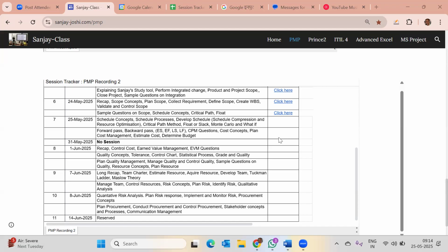So mostly he will add it into the next sprint backlog, Kuldeep. But that's not the ideal way to get it put in. You don't do it. What I mean is that the team should not do it. Let the product owner do it. Sprint backlog is given by the product owner and maintained by the developer. Correct, Raj? Absolutely correct. So prioritization, Raj, is not your cup of tea.